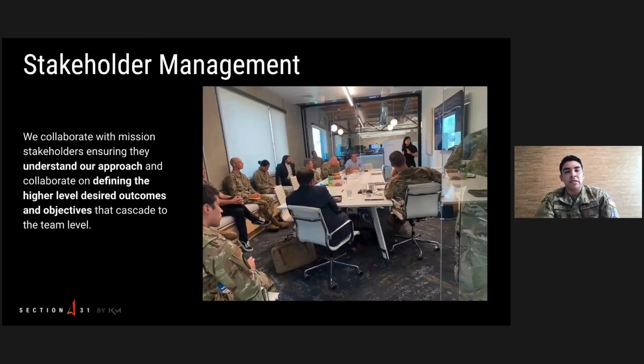In the DoD, stakeholders ultimately decide if they like the products they're receiving and if they're delivered in a timely manner. If the answer to both those questions is no, then you as a program office can ultimately lose funding for your product. Knowing this, we wanted to make sure that our key stakeholders understood our approach. So we spent a lot of time teaching them about Agile delivery, sharing with them our long-term plans for the system, and moving away from the mindset of requirements and dates.